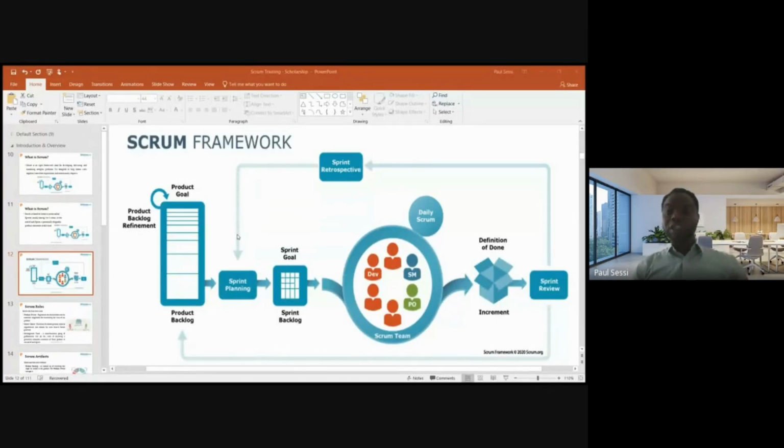Now, those are four different goals. Each of those four things has other metrics, right, that will make it achievable, if we further break them down. So it makes each of them like an epic, what they call an epic. Those are the goals. So what we call epics are what can still be further broken down into more user stories, right?